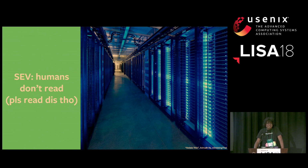The task also had a very clear, concise description that said something to the effect of, please make sure that your retiring assets have been drained and they are ready to decom before you mark this ticket as completed. What it should have also said was, it should have used a klaxon emoji saying, look, these machines are going to be nuked. You better not be using them when you mark this ticket as completed. The ticket should have also said, once you mark this ticket as completed, we are going to nuke these machines and you will not get them back.